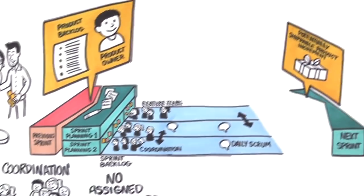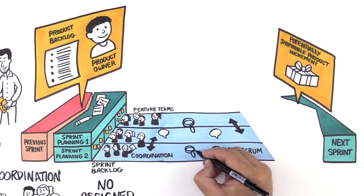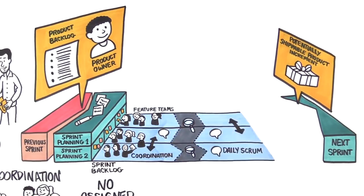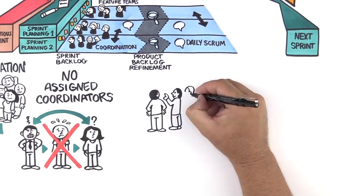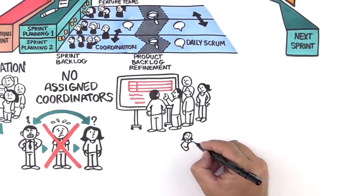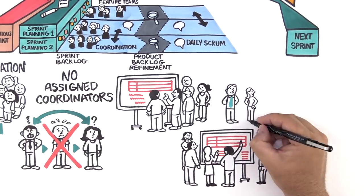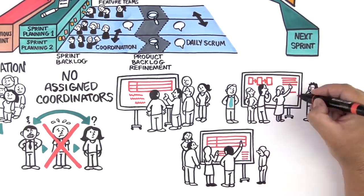Halfway through the sprint, teams briefly pause the current sprint work for product backlog refinement—collaboration with customers and end users to clarify work for future sprints. By connecting teams to customers, we free up the product owner for vision and prioritization.